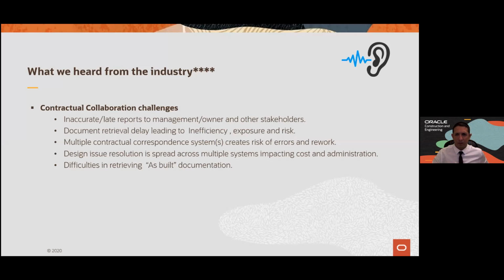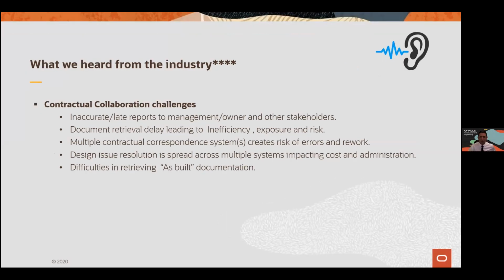we need to be able to deliver the as-built documentation. What happens in our industry is that you build a building and it's completed, but in the last 2 weeks or the last month of the project life cycle, a lot of companies are scrambling around to put together the as-built documentation. If you don't have a good record of that, the owner will not be able to use the documents as designed, because the people who build the project are not the same people who maintain the project. So you need to have that proper documentation.